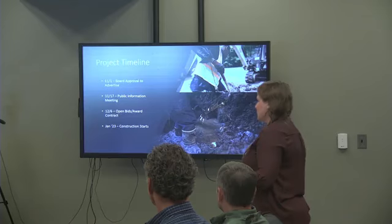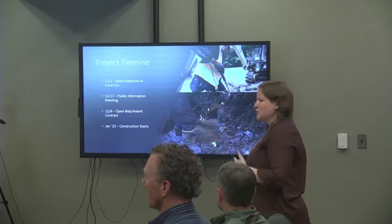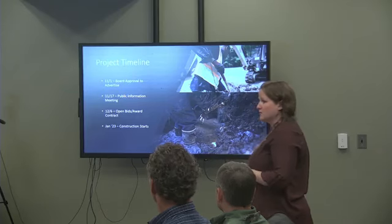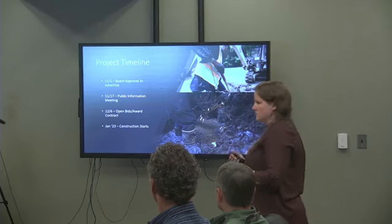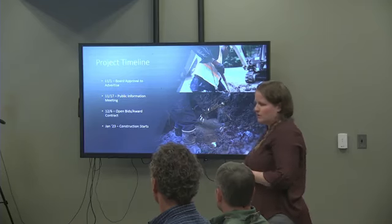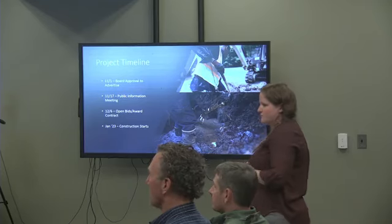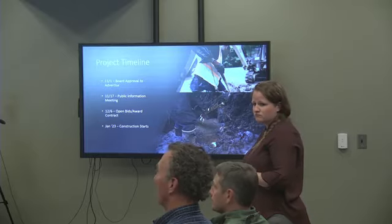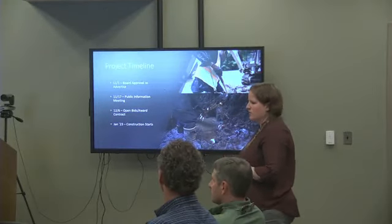The biggest impact we think that we're gonna have during the project, once it starts, is just gonna be to traffic. Like Kurt said, minimal impacts on the sidewalk for Main Street due to not many services being connected in the front. But lane closures, detours, things of that nature, we're looking at being the biggest impact. Okay, are we staggering? How are we doing that? We will coordinate with the contractor to make sure that this is as least disruptive as possible. And then our next coordination effort with the contractor is also to do these service transfers and changeovers that we discussed on off hours. So first thing in the morning, last thing in the afternoon, not while they're trying to conduct business during the day, to minimize those impacts as well.